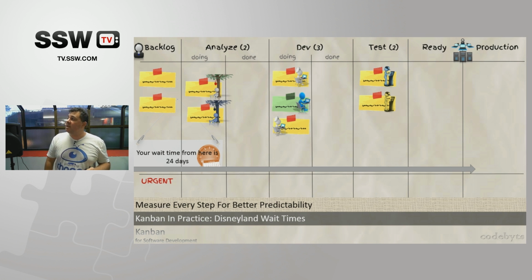And that's what we use actually for Kanban most of the time. I told you that each of these cards, each of these items, whatever user stories, features, things that you're working on, when they go over from column to column, they're actually calculated, they're actually timed. Then, whatever you decide with your team, a month or 2 months, or 10 user stories when they're deployed, the stop point, the milestone, you time them up until that point.